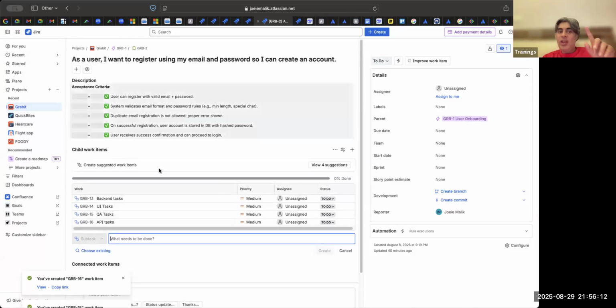See, this story has all the technical layers: UI, Java, backend. If it were only a UI task, you are just creating a form here. So in UI, they will just create a user registration form. Let us say I create a story which is just a UI story: I'm just going to create a user registration form. That is not a valid story. People can still do it, but in Agile, you don't consider that a good story because it does not conform to INVEST criteria.